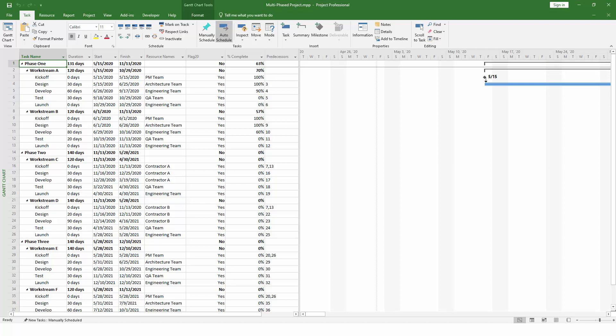This project plan has a lot of information, and we want our OnePager chart to be a higher-level overview, so we need to tell OnePager which key tasks and milestones should be included in the chart. To do this, insert a flag field like flag 20 into the project plan and place a yes next to the items that should be displayed in OnePager.